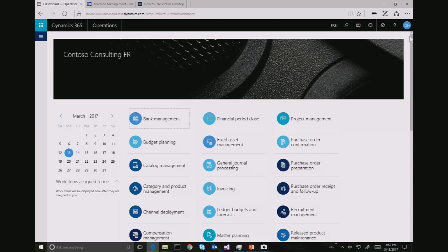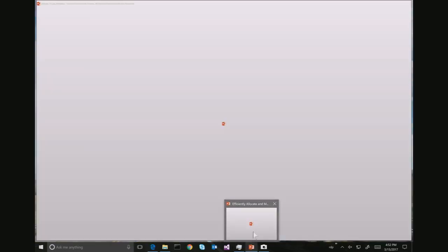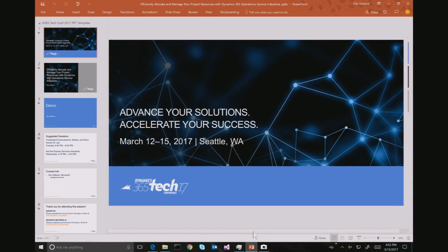Regarding the lookup, even though I'm in the role of mechanic, for example, in HCM you can associate me with the skill of driver. So in that case, when you look up in the project for people who have the skill of driver, you can still find me, though my role is mechanic. So it's more lookup on skill versus role in that particular instance, if you want to go more granular. Okay, that's correct.